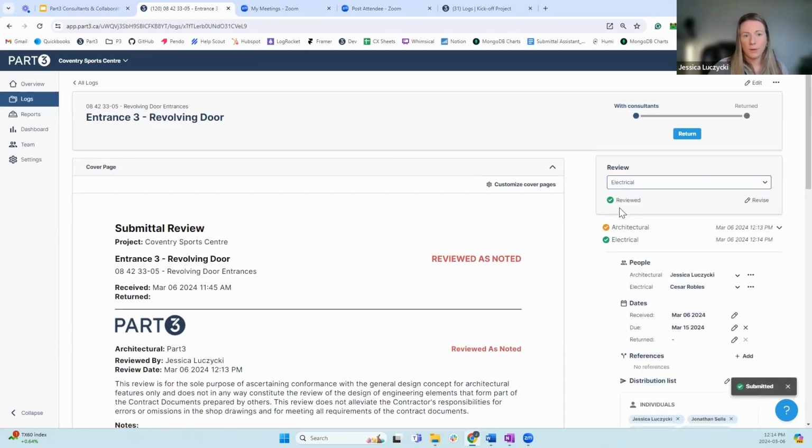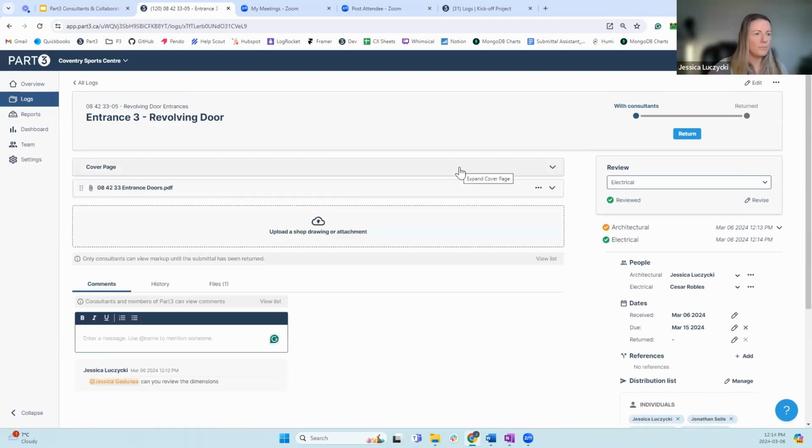So electrical. Even though electrical said it's reviewed, part 3 will take the worst case scenario, in a sense, of this is overall reviewed as noted. After everyone's completed their review, the prime consultant on the project, in this case architectural, it's me, I act as the gatekeeper.